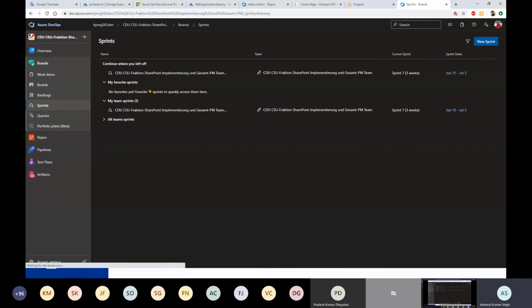From your backlog you can assign the work to an iteration path just using drag and drop. You don't need to write code. You can then view that work as a separate sprint backlog. You can implement Scrum practices and so on.